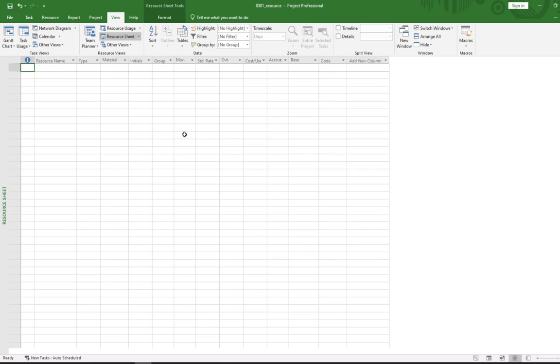This will display a table related to the project resources. Obviously at the moment we haven't put in any resources, so it's blank, but we're going to start putting in a few different things now, and it'll make a bit more sense as we go along. These are the resources you assign by time, like people or equipment. To name them, you can fill in a person's name, or you can use a generic skill. In this example we're just going to use skills.